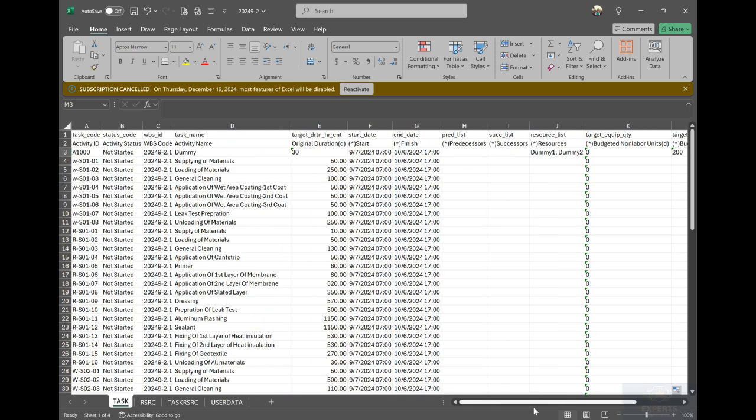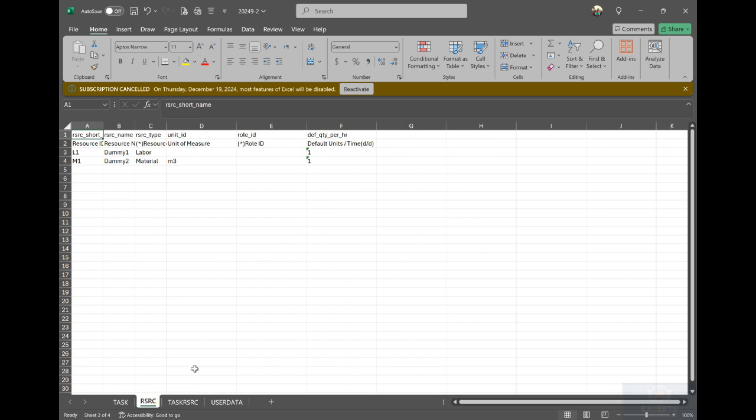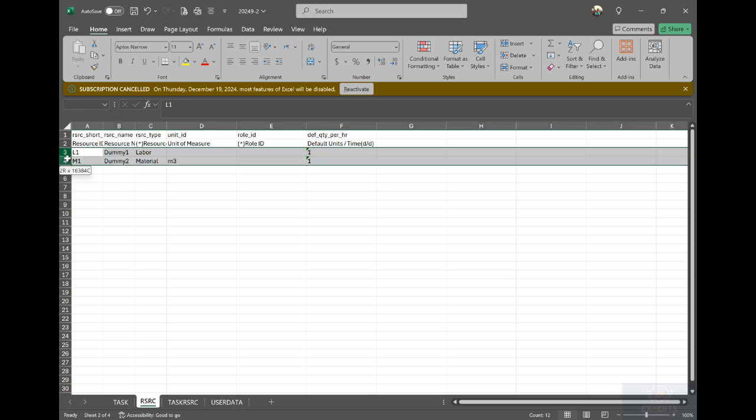Number 2 is resource here. As we explained before, if you define resources here, it will not accept anything, but you can make some changes here, so either it will come to the same resource, or it will update or define a new resource, but only from here. You cannot insert more data, so you can play only in these 2 rows. Whatever you insert, it will not accept.